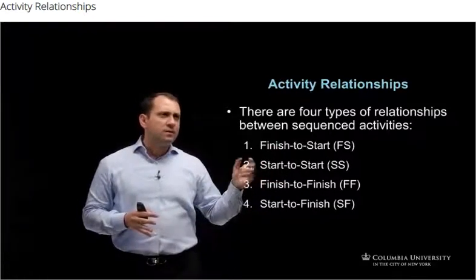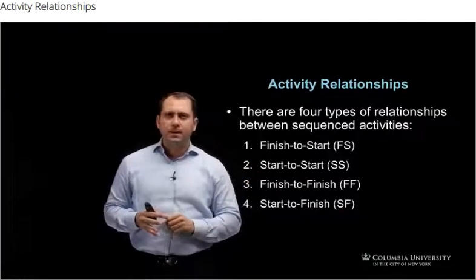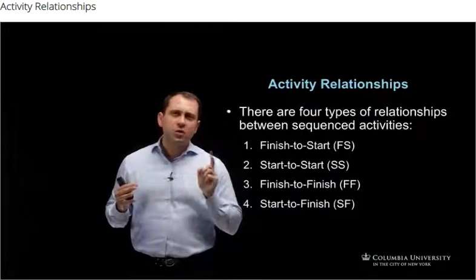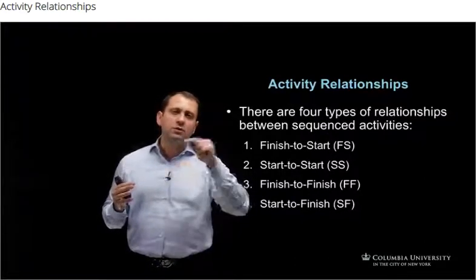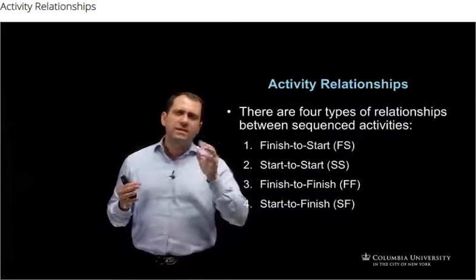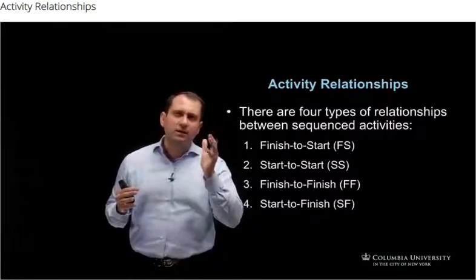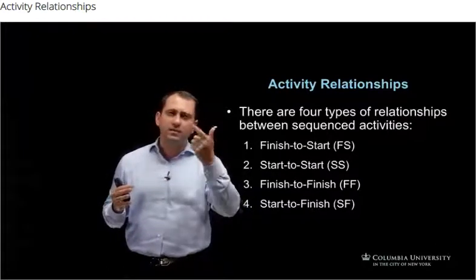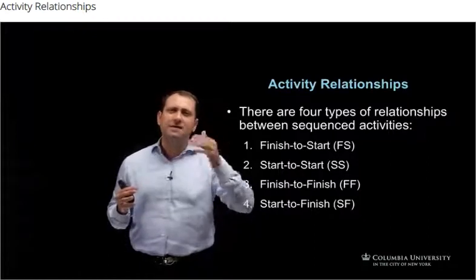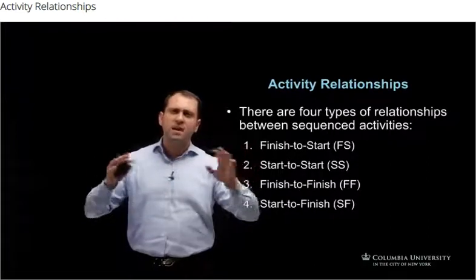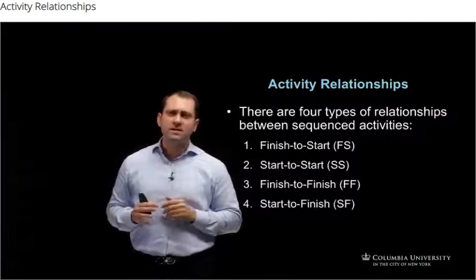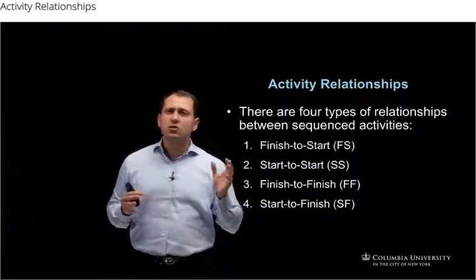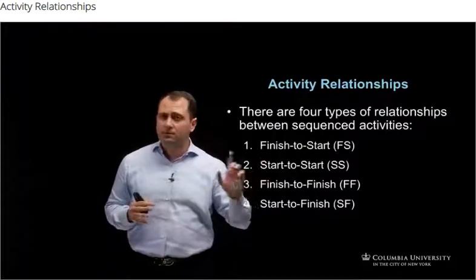Second is the start to start relationship. A start to start relationship is when one activity starts, so can another activity also start. For example, we can start with the HVAC activity, or the plumbing activity, or the electrical activity at the same time when the site work has been done, and we want to start all these at the same time. But of course, in this case, these activities do not need to finish at the same time.